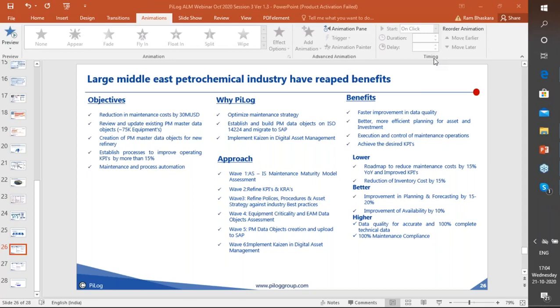Thereby, you will have entire data starting from materials, drawings, as-built drawings, all the design, all the specifications, purchase specifications of all the material and the services which they avail. Thereby, you have ready-built data available in your system, and this data can also be used to create the functional locations, fixed assets, and also the equipment master without looking into these data again, because it is coming directly from the EPC contractor's system, where he processed the design, the procurement, and did the installation.